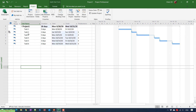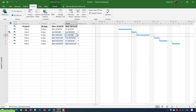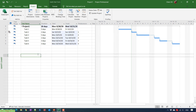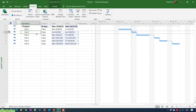After clicking OK, task number two now shows an icon in the indicator column, showing that the 'Calendar with Weekends' is assigned to this task. Saturday and Sunday have been added to the task's working days, and in the Gantt chart you can see the task is working on the gray-colored Saturday and Sunday. The next task, task three, will start from the following Monday.